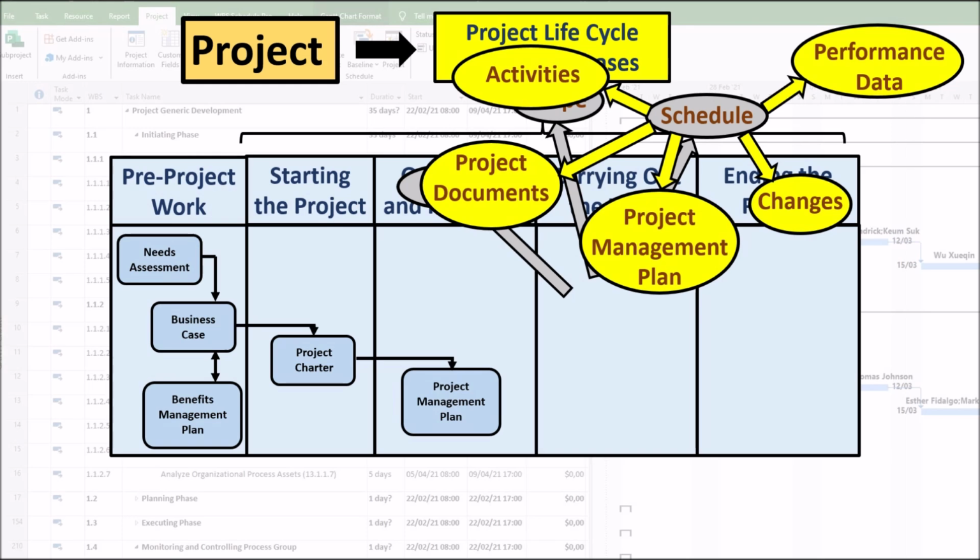4. Project schedule. An updated project schedule will be generated from the schedule template populated with updated schedule data to reflect schedule changes. 5. Resource calendars. Resource calendars are updated to reflect changes in resource calendar utilization that were the result of resource optimization, schedule compression, and corrective or preventive actions.